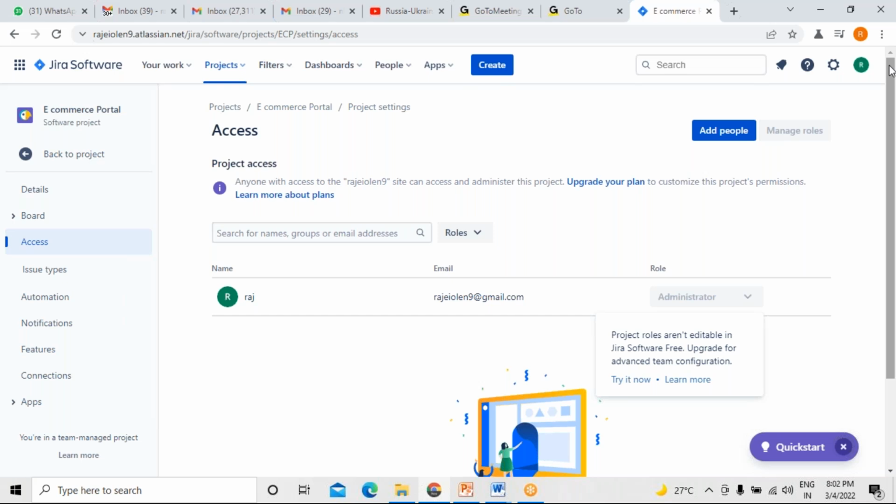For the release plan, initially we thought of 10 sprints, right? That is what I told earlier. Whenever you have started the work, then only you come to know the actual capacity, whether you are going in the right direction or not. So one calculation has to be done based on the velocity. What I am getting from this is that in the initial release plan we gave the number of sprints based on assumptions and understanding, but after two or three sprints we come to know the reality and give the actual estimation.